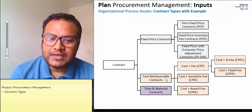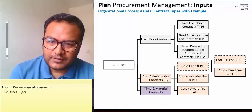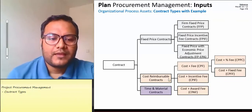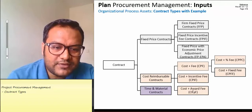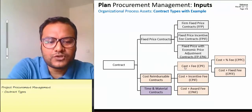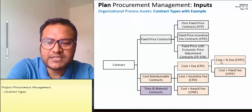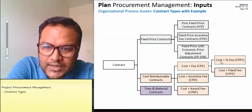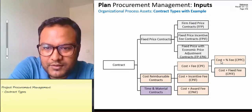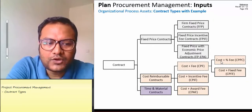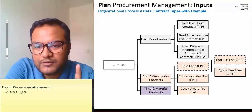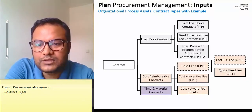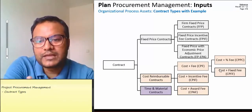So the legitimate costs for a table are reimbursed, plus we have to pay a fee. The first type is cost plus percentage fee, which means the fee is a percentage of the total cost. For example, if we agree on a 20% fee and the cost is 90,000, then the fee is 20% of 90,000.